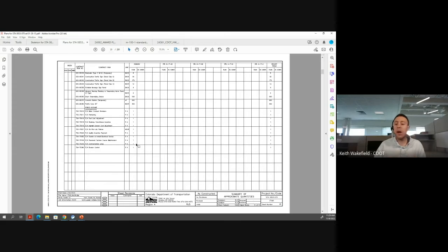We could either pay for it on a force account basis, which is labor, equipment, materials, and we do the whole Form 10 process in certified billings in order to do that. Or we could do a change order and we can reconcile against your force account on your overs and unders report to make sure that budget is being allocated towards new items to the contract. So it gives you a little bit of flexibility with regard to these force account items. Some of them are like fuel cost adjustment, which really depends on if the contractor elects to utilize a fuel cost adjustment or not.